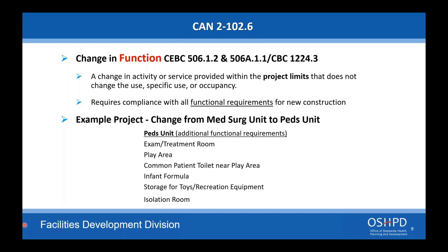Now, if you switch this and you're going from a pediatric unit to a med-surg unit, what are the new different requirements for med-surg? There actually isn't any. You can actually do this with zero construction. You just reassign the rooms that might have been used for these other areas, play areas. But you can conceivably do a zero construction change from a pediatric unit to a med-surg unit.